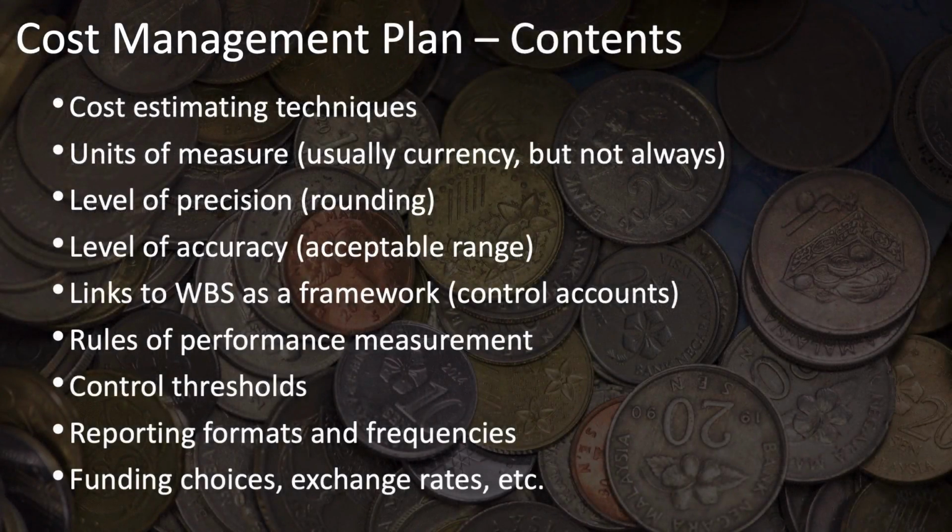The contents of your cost management plan are similar to the contents of your schedule management plan, just for costs this time instead of schedule. It begins with a description of the cost estimating techniques that you will use on your project. There are many techniques that we will come to when we get to the tools and techniques for cost management planning, and those should be specified here in the cost management plan.